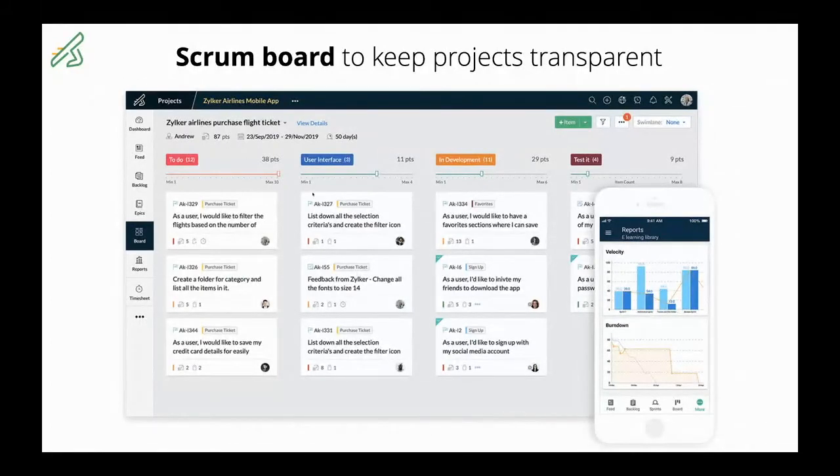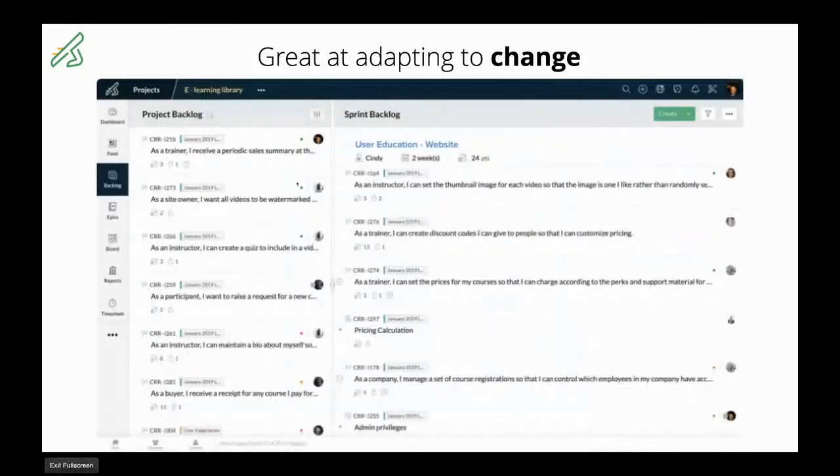first come into sprints, let me just change this slide. You'll see, sorry if this is a bit blurry, you'll have a backlog here. And basically, you've got your project backlog. So you just add every single task, everything you have to do, into your project backlog. And you don't have to have everything defined when you first start. You can continually add into that.